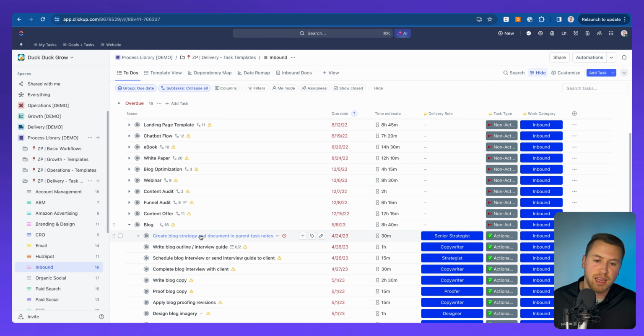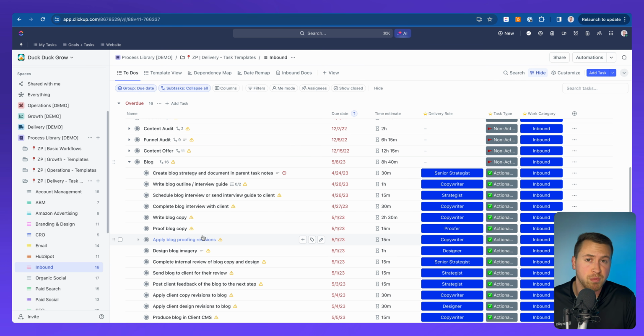You could take that and just say, hey, we basically have that workflow built out, but right now we're just using one task assigned to multiple people and trying to use those statuses to automate the due date changes and automate who's assigned to this task. And you're building some complexities in there. Say, hey, let's just take a minute and document all the steps that we need to complete this blog post, get it out of the statuses, and build it as subtasks.